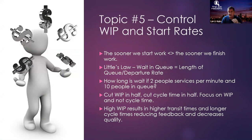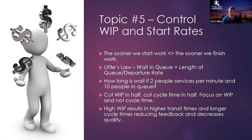Topic number five: controlling WIP and start rates. Work in progress and batch size are similar but not exactly the same. The idea of WIP — work in progress — is to keep that low as well. We tend to have too many things going on at once, and when you do, it's going to take you longer to finish all of them.